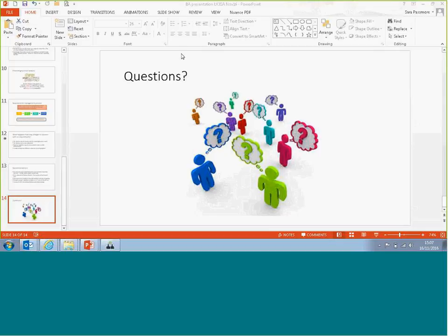Okay. And Spencer has asked, how many projects do each BA tend to work on at any one time? Yeah, that's a good question. Some people have perhaps worked on 4 at a time, which was the most, and that'd be because they're at different stages. One might be just starting up and they're having some initial meetings, scoping it, trying to understand it. Another might be closing down, so they would be answering last-minute support questions as it was transitioning to support. That would be quite a lot, I think, to have 4. So people would be on one large project or perhaps 2 smaller ones at any one time. That would be more typical.